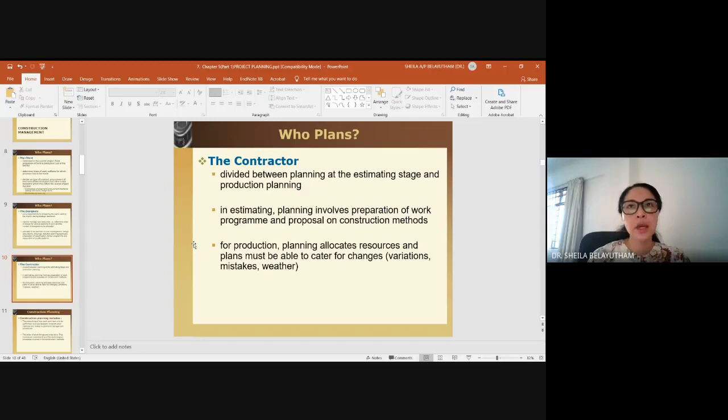Okay, so you will need the experience that you have gone through. In construction, M&E comes along together with the contractor. M&E comes along with the CNS. For example, you have embedded electrical conduit or a piping system which is embedded. So those are the things you need to think about: it's not that CNS finishes everything and then M&E comes, unless your M&E is not embedded within the ground. But I highly doubt so. It comes along together basically.